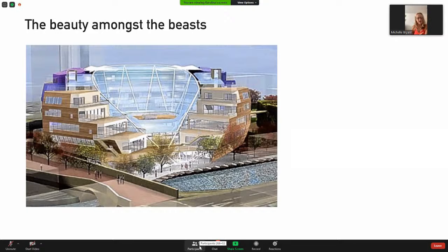So it's all about prioritizing milestones, identifying the critical ones, and also having firm baseline plans. So you've got all your documentation, everything's in place, and you can get on with delivering. You've got all your resources signed up. They're all clear on what they're doing, and just getting on with it. My big bugbear is also about documentation, people turning up at meetings and they don't have their dates and versions on documents. You could be looking at a plan that's 2 or 3 weeks old and you're wasting hours.